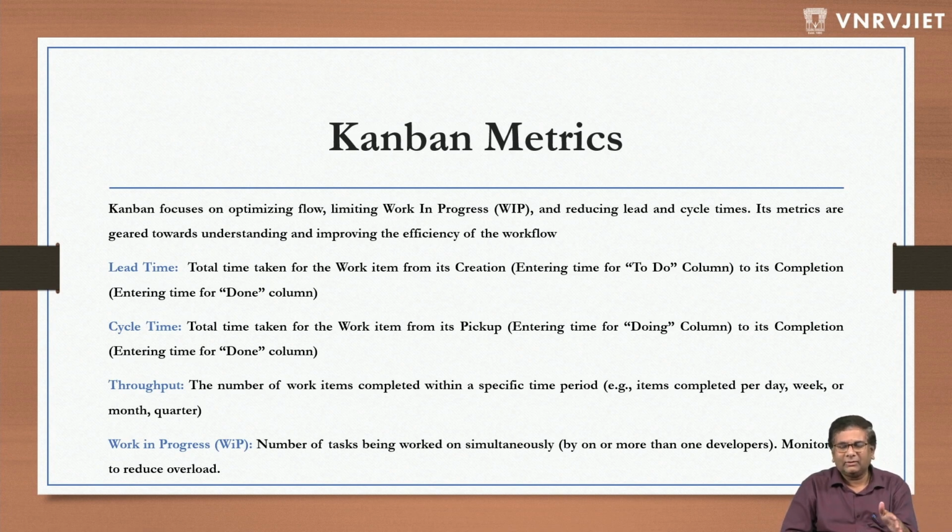But for certain medium or low priority items, cycle time is calculated only from pickup time until the completion time. That is the cycle time. Lead time is from creation to completion. Cycle time is from start to completion.